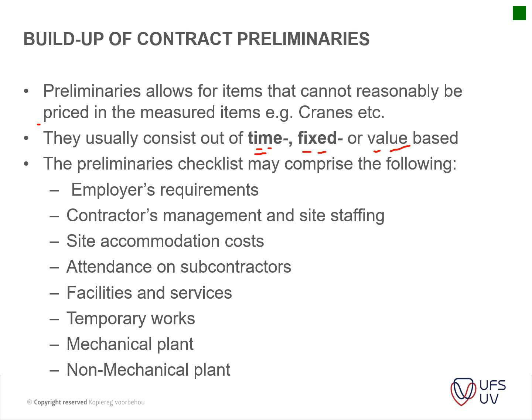So if your payment certificate gets you to 50% of its value, you can get 50% of your value-based preliminary items. So just be mindful of that.